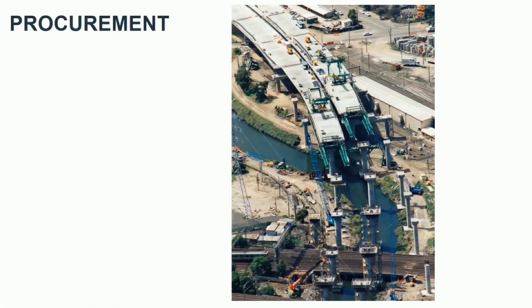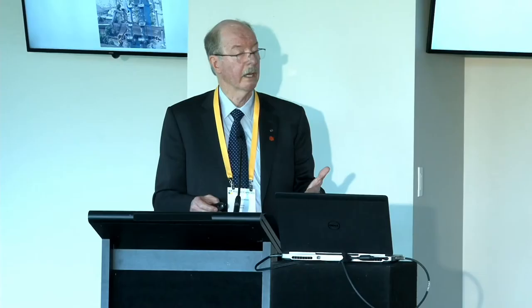For procurement: on Western Link with Balderstone there were underslung trusses — two per carriageway on the northbound and southbound, each 100 metres long. This is around Spion Cop in the Moonee Ponds Creek area. The procurement was done in New South Wales, and when the trusses arrived on site the welds were undersized and incomplete. We had to re-weld and re-proof them, causing a six-week delay at the start of the elevated road.